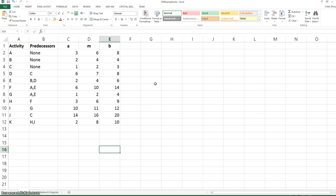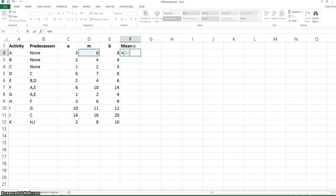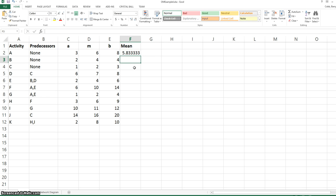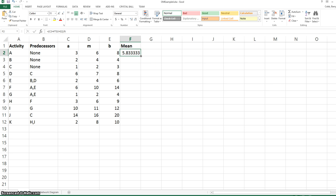When three activity times are provided, the first step is to calculate the mean completion time for each activity. This is equal to the optimistic time, plus four times the most likely, plus the pessimistic time — this quantity all in parentheses — divided by six. By clicking in the box at the bottom of this cell, we can copy this formula down to the other activities.